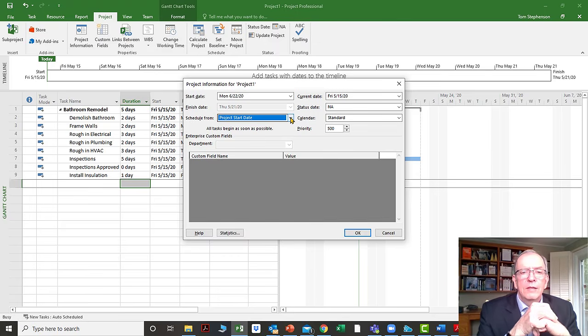You'll find that scheduling from a finish date, maybe if you're a wedding planner or something of that nature, you might want to think about it in those terms, that you've got the hall rented on that date. But other kinds of projects, IT projects, construction projects, what have you, we schedule from a project start date, and then we see where it lands. If we're not happy with the finish date, then we adjust things so that we can make it finish on that particular date. So we look at it if it's possible.